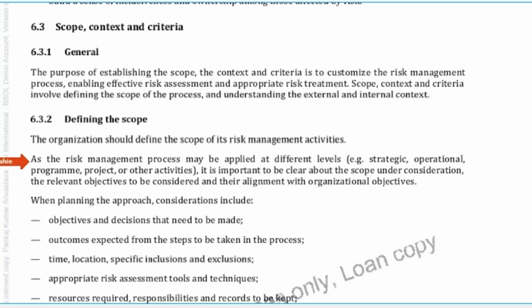Then what are the appropriate risk assessment tools? For example, when we're looking at a communication and consultation approach, we can apply a brainstorming technique. When we're looking at an analysis of the risk, we can look at the five whys. What can happen, why, where, and how. So we can have different techniques for conducting the risk assessment, and we need to decide what tools we need. We may have automated tools, things of that nature.